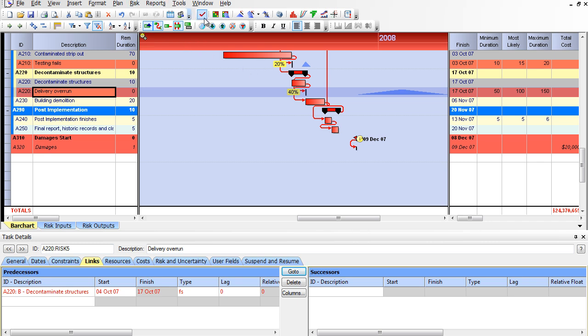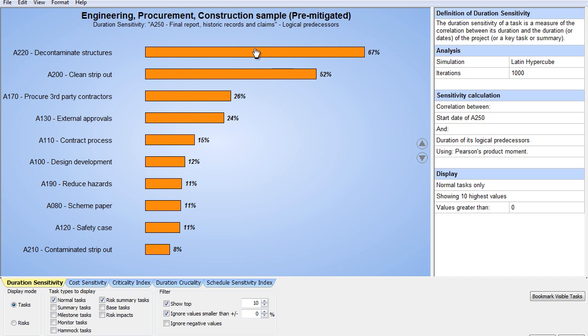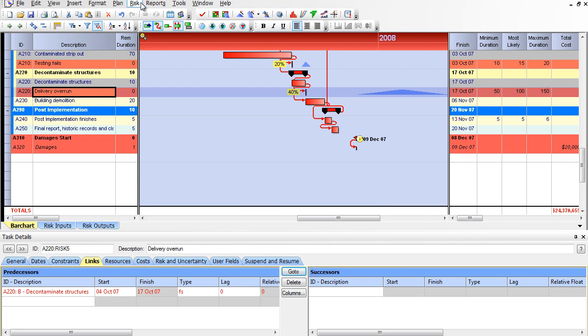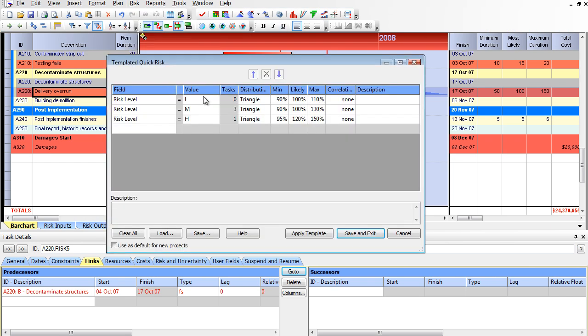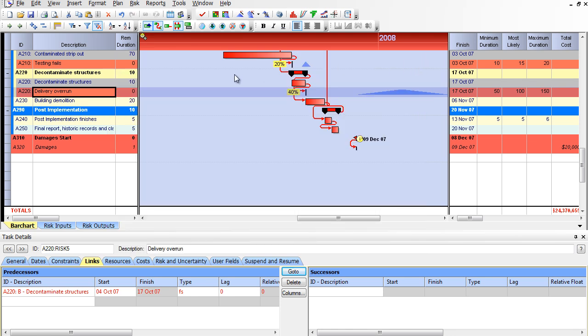Anyhow, moving on. What I want to do now is place what-if scenarios on those activities if I can. If I can't play what-ifs on those, I'm going to have to look at alternative means. I may have to go into my quick risk template and find some ways to do some things. I may have to look in here and ask whether there is anything I can do to expedite these chains of activities, because there's only two activities that give me massive impact.